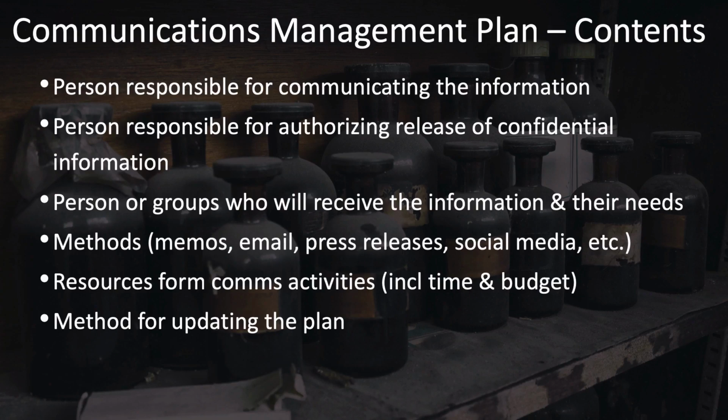You may also need to specify who's responsible for authorizing the release of any confidential information. You may have some communications that have sensitive information in them that need to be reviewed and approved before it goes out. Also, you should identify the people or groups that will receive this information and what their needs are.